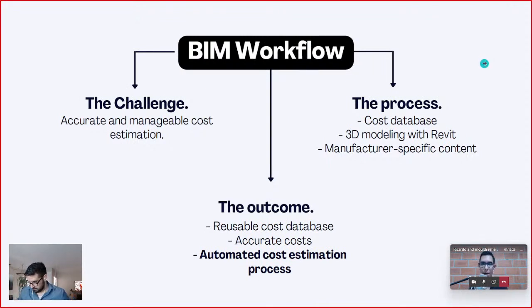So what was the outcome? After that process of iterating back and forth, we ended up having a reusable cost database. And I'm going to stop here a bit. The cost database is probably the most overlooked item in cost estimation when you're just getting started, but it is the core. If you have a solid and reliable cost database, the process of estimating with BidLight is going to be a blast. I mean, it takes around 10, 20, 30 minutes at max, because you have previously worked so hard on getting the cost database right.